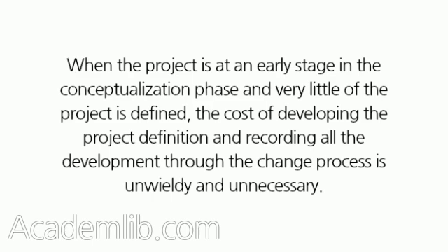When the project is at an early stage in the conceptualization phase and very little of the project is defined, the cost of developing the project definition and recording all the development through the change process is unwieldy and unnecessary.